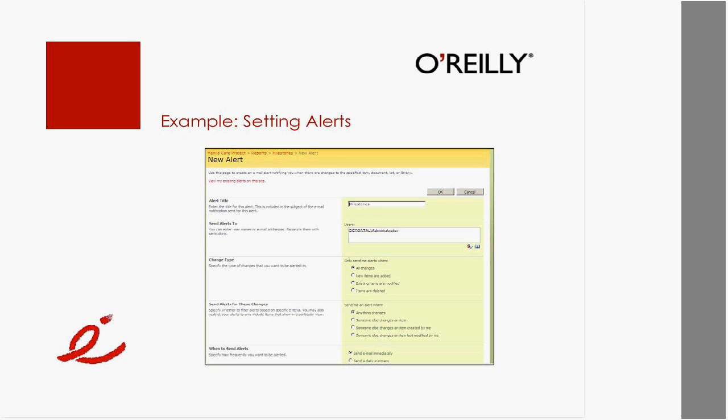These are email notifications that you can define when certain things change. For example, somebody enters a new date in your milestone, or somebody changes something in your milestones list. Once that happens, we can automatically send out an email to whoever wants the information.